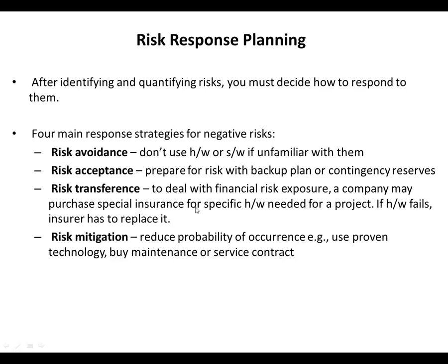By risk avoidance, what we can do is we would not use any software which is very unfamiliar to us, or any hardware which is unfamiliar to us. We are going to use very familiar, widely used software and hardware. So then we have avoided that risk. Normally, with widely used software, most of the bugs are resolved. Because of that, that risk would not occur. So that's the first response strategy.